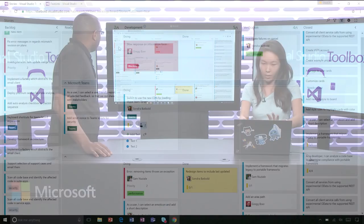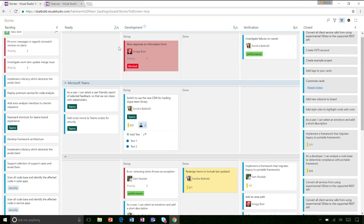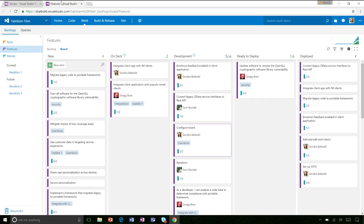You can create Kanban boards to manage your features — I'll flip over to that as well. You'll see these are the user stories and bugs the team is tracking. Someone like myself or my manager might track features, which are shippable increments going out every three weeks for a sprint. If I flip over to the features board, you'll see a similar Kanban board with different columns tracking features going out to customers. So these are the features that are parents of the items we saw on the other board.